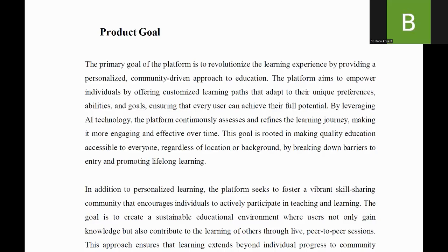Next, what is product goal? What, in the sense, it should be a measurable milestone on the way to achieve our vision. That is a product vision. Usually, the typical timeline to achieve such a product goal should be only within a few months, right? So product goal always should be a short-term actionable target for immediate sprints. So each sprint, we have already discussed, should be within 1 to 4 weeks.